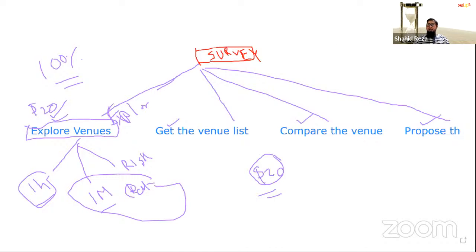Similarly, if I analyze this again and try to find out how much time it will require, and what type and how many resources are required, and if we know the rate of the resource, then we can also know the duration of the activity, and also the cost.